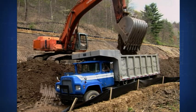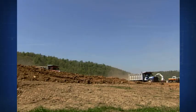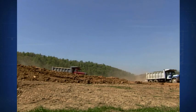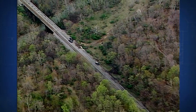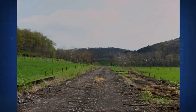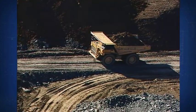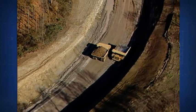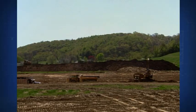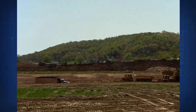Two sites at each end of the corridor were available as fill sites for waste disposal. Even so, this was no small task. Poor site access through just 2 public roads slowed grading. Some landowners would not allow construction equipment to pass. The grading crew had to haul 14,000 truckloads of dirt up and down a narrow 5-mile corridor to reach disposal sites. Norfolk Southern anticipated soil problems by drilling core samples along the length of the route.